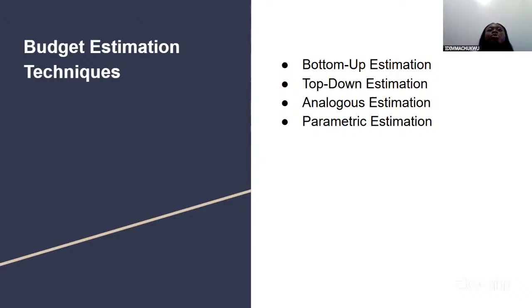And you know that what it actually takes to sew a full-length trouser is, say, 3 yards. Now you're going to use the cost of 1 yard and multiply it by how many yards you're going to need to actually sew a full-length trouser. So this technique is known as the parametric technique, right?